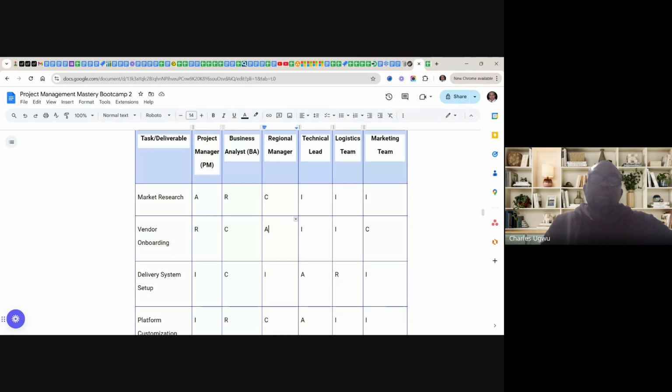And every other person, the project manager needs to be informed, and business analysts need to be consulted, and the logistics team here need to be responsible, because logistics is within the domain of delivery system, so system setup. So the logistics team should have enough technical expertise equally to make sure that this is done. And the marketing team, this setting up is more of technical work. So the marketing, they might not contribute much here. This is not marketing, this is developer work, but they need to be informed because they are part of the